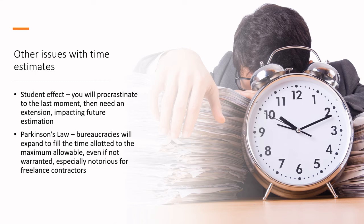You need to think carefully about dependent activities versus parallel activities. There are also well-described phenomena that affect time estimates. One is the Student Effect — you're given a two-week deadline, you wait until day 13 of 14, and suddenly realize there's more than one day's worth of work. The Student Effect means you procrastinate to the last moment, request an extension, and that extension causes a wait-and-queue effect on later activities.